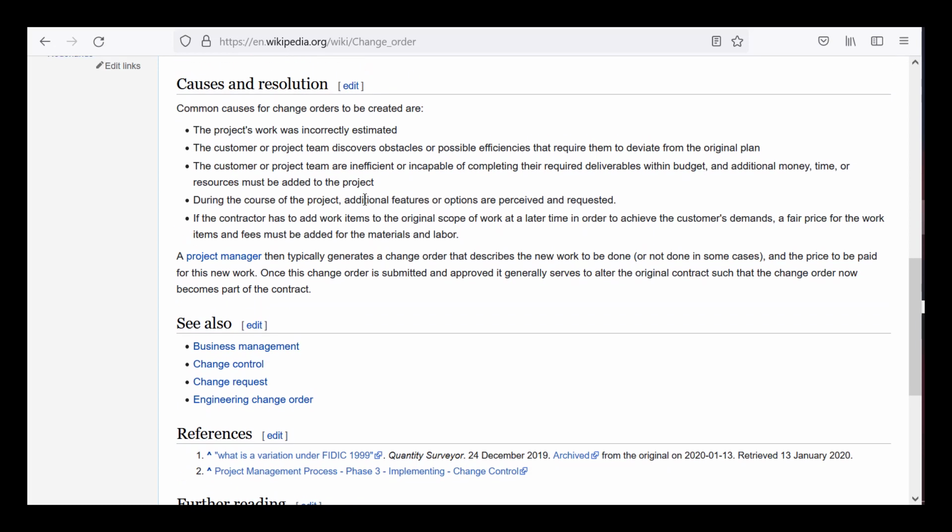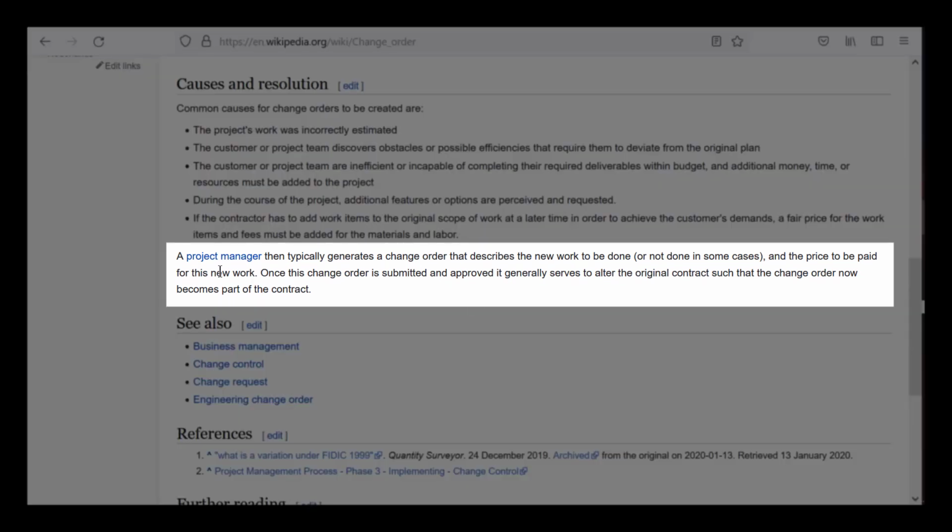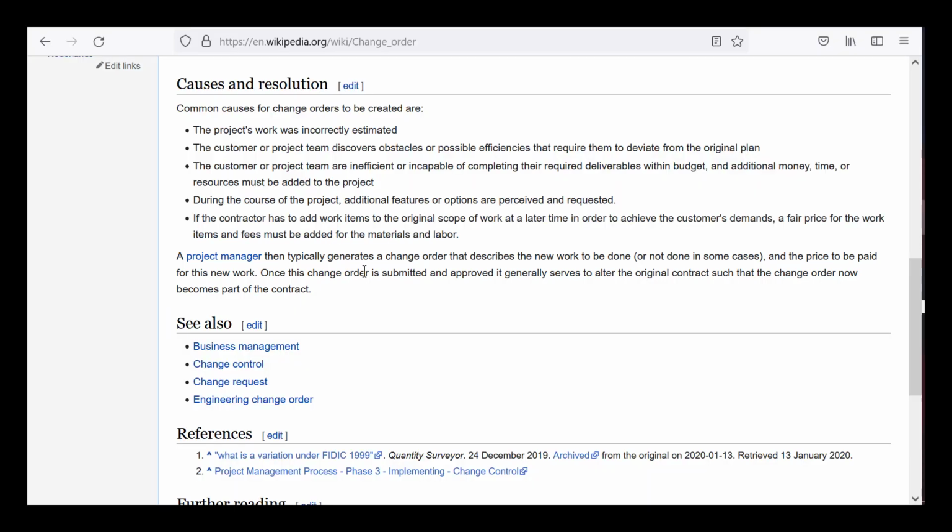And also I'd like to point out that CHS not only has a place for you to enter the price of the change order to the home buyer, you will also be estimating the change order cost and see how that affects your original budget, adding the change order cost to it to do a revised budget. So that's just a brief description of change orders.